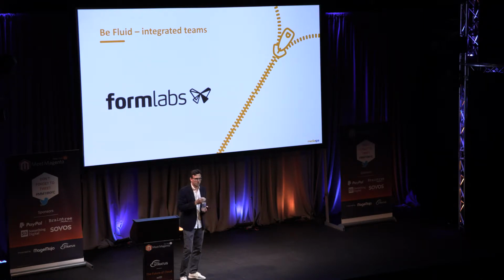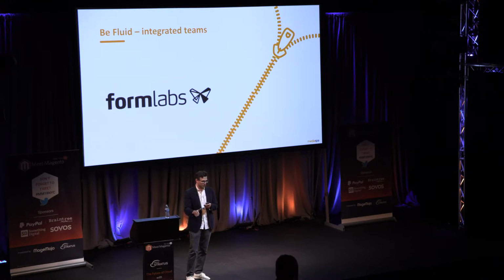And so we were fluid, and we changed the script. We decided that we didn't need to have a project manager running every meeting without the developers, because the developers and the complexity of the integration work was the key to getting this thing on track. So we did what no agency wants to do, which is that we put our developers directly in touch on a daily basis with our merchants' developers and let them have at it. And then we had to fight to figure out how to keep the project manager in the loop so they could still manage the project. And it has worked quite well, and that project, which was very behind, is now grooving.